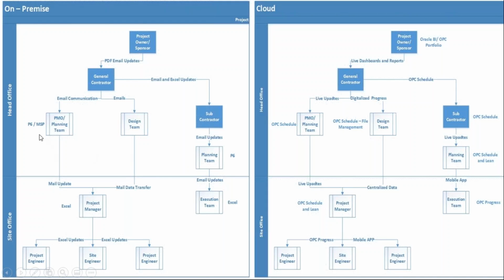Finally, it's the scheduling team who will go through that and update it back into the systems. Then they create an updated schedule, then create some reports. Those reports, sometimes also in Excel sheets, go back to the management for their fortnightly or weekly discussions.